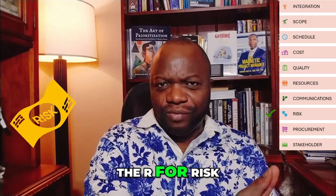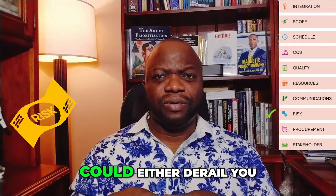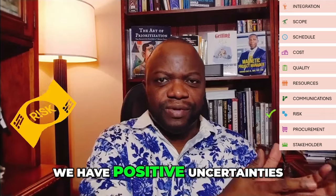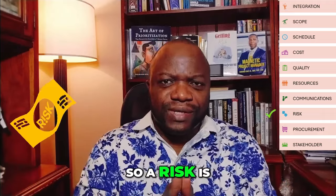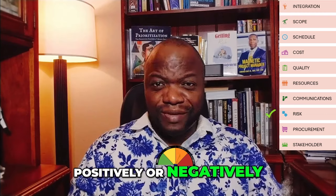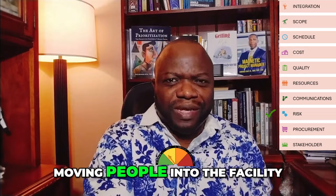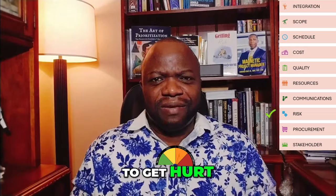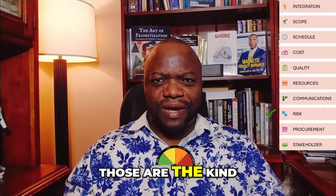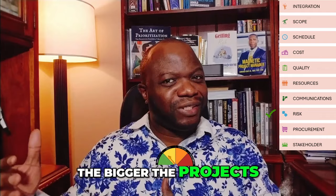Then we get into the R for risk. Risk is all about managing uncertainty. Uncertainties are things that could either derail you on the project, or they could actually work well for you on the project. We have positive uncertainties and negative uncertainties. So a risk is an uncertain event that, if it happens, could affect your project positively or negatively. And as a good project manager, you need to account for all of those. So in my example of moving people into the facility, you don't want anyone to get hurt. You don't want fingers to get jammed. You don't want people to fall over if someone's mopping a floor. Those are the kind of things that you scale up when you get into bigger projects with bigger money. The bigger the projects, the bigger the risk.